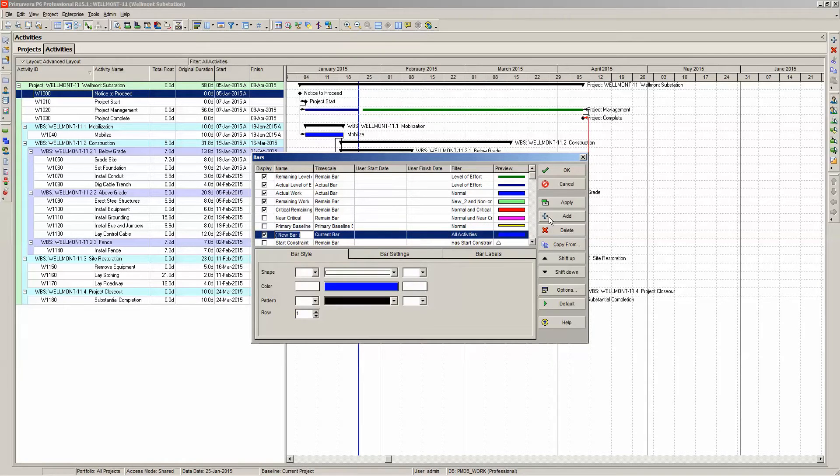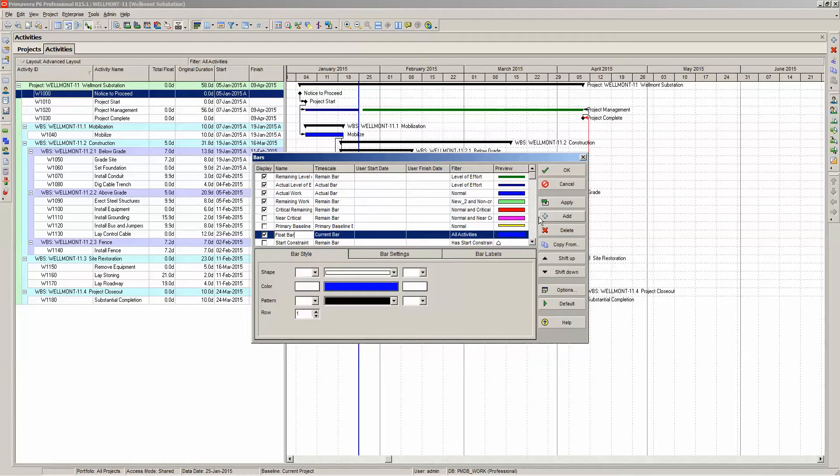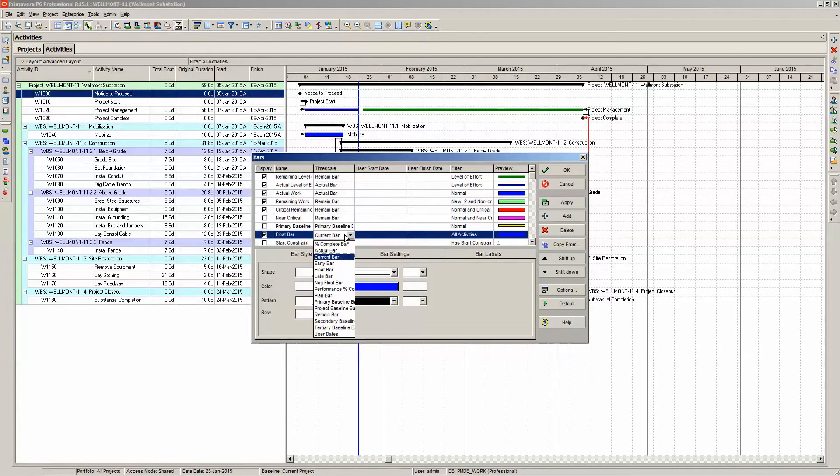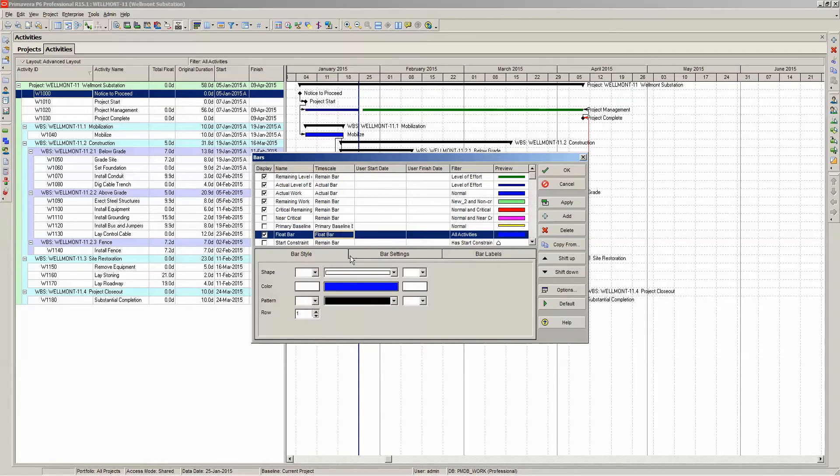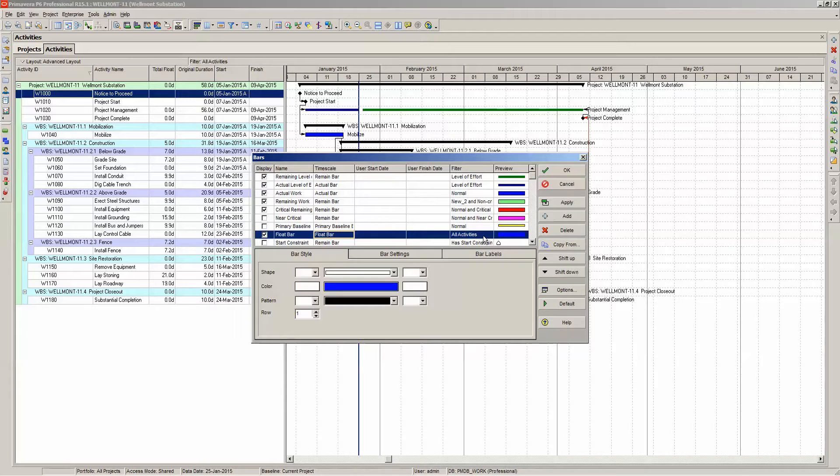I'm going to type in the name float bar for the name. The timescale, this is very important, the timescale is going to be float bar. Then let's go with all activities now for the filter. We are going to change that later on.